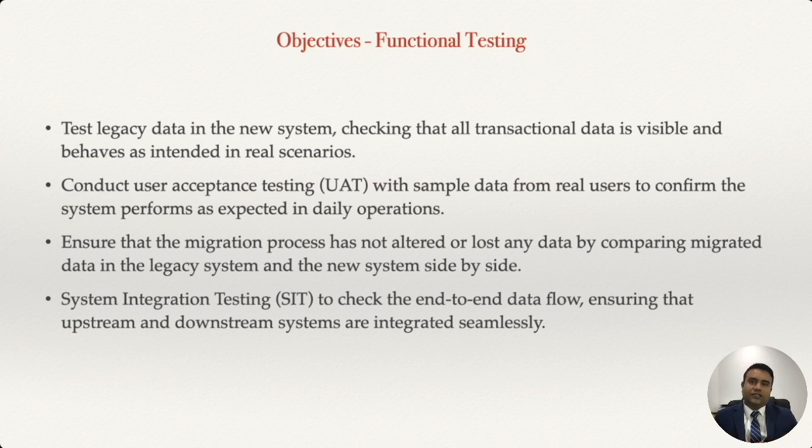Incorporating functional testing early on in your iterations will eventually maximize your testing scope. You are not parking your testing for the last moment. Rather, you are testing as you progress through iterations, and you have enough confidence in your data migration processes, and that would enable you to go with the lower confidence level and a higher margin of error, to be assured that the final data migration testing you are doing, the functional testing, is good enough for your migration because you've been testing throughout the iterations.